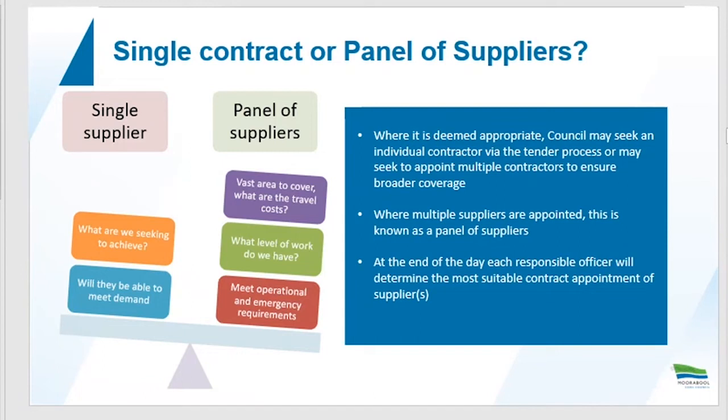Some of the reasons that we go for a panel is it might be something like our trade services where we have a number of sites across the municipality that we need to maintain. And the travel costs from one end of the Shire to the other can be significant depending on where that plumber is primarily based, or also their capacity to address any urgent repair or maintenance requirements. So by having a panel, it provides an opportunity for us to share the spend within that category across multiple providers.